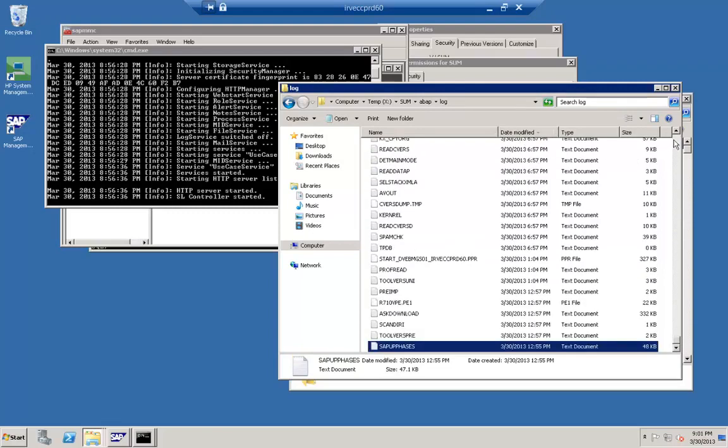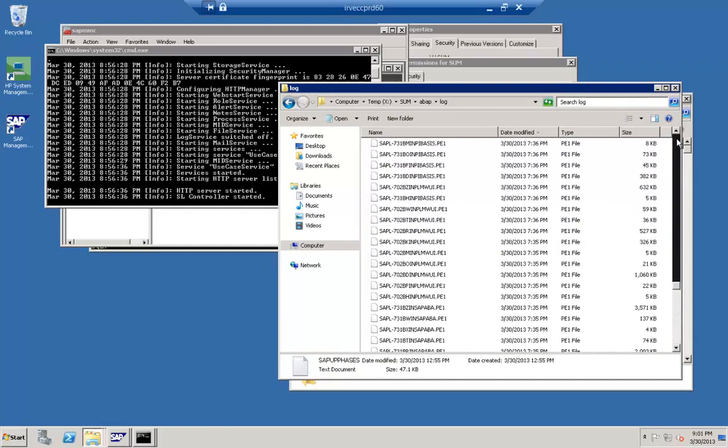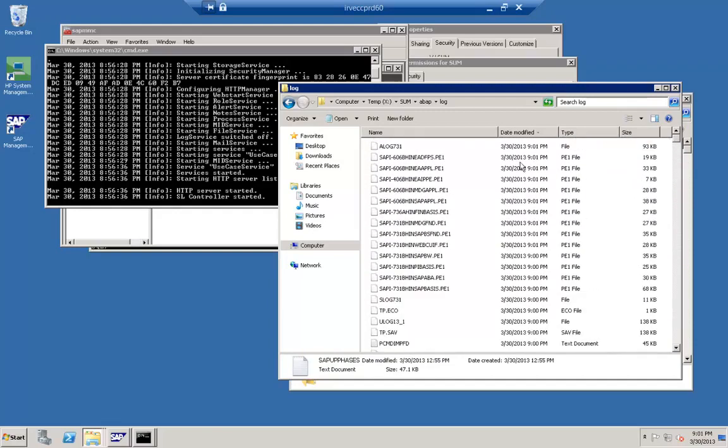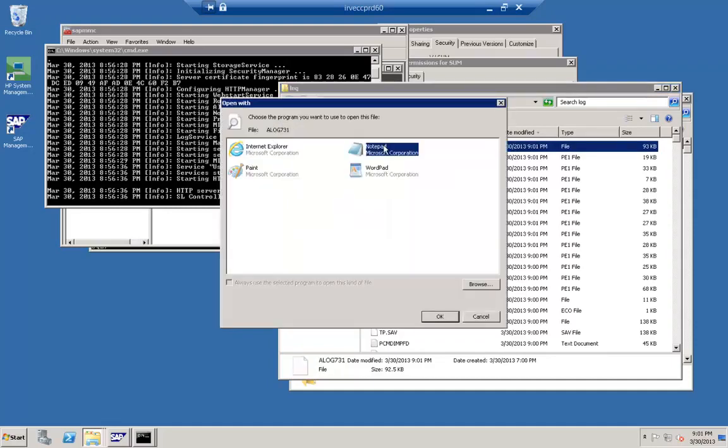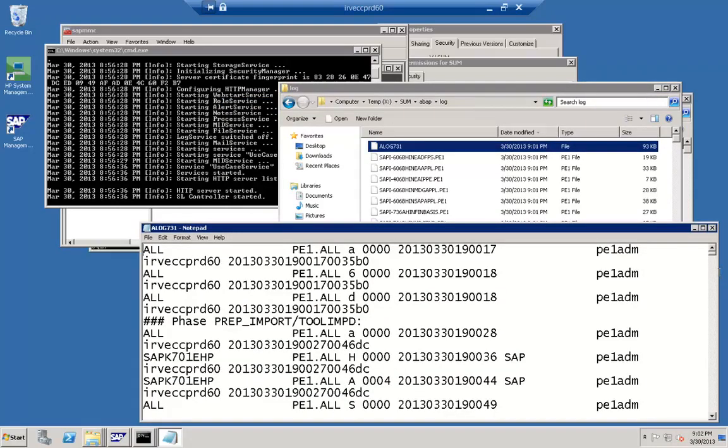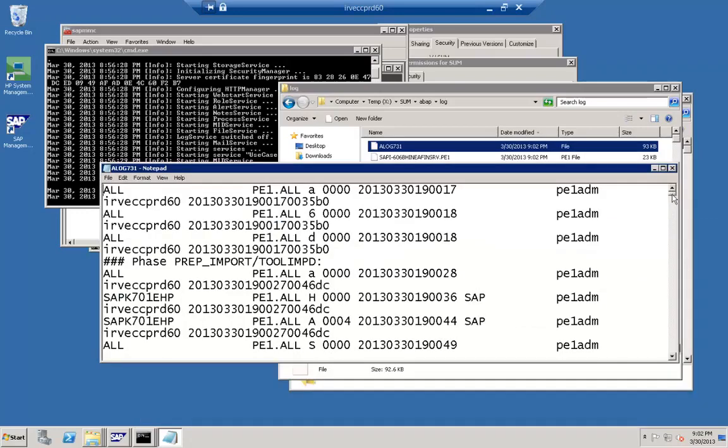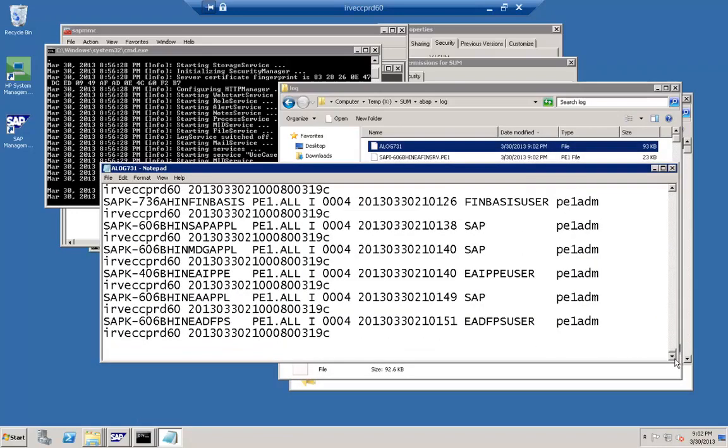And suppose there is no work happening during this particular phase, say for a few hours, or we end up eventually losing 24 hours because of our improper review of the log file to find out if there is any activity taking place in the system. Okay, so based on that we need to keep monitoring.